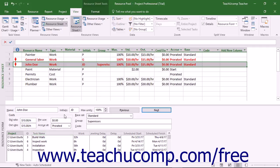Note that to update the sharer plans with the most recent changes made to a resource pool, you must open the sharer plans to update while you have the resource pool file open, but after making the changes to enforce in the resource pool.